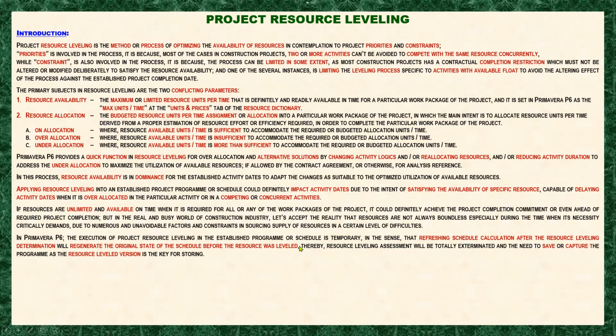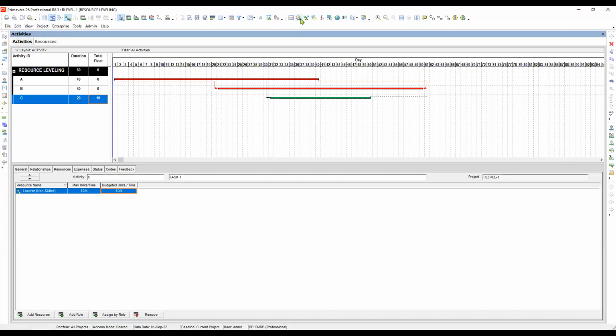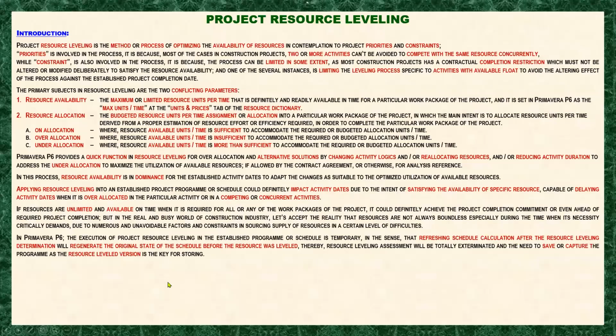You know what I mean? When you run leveling on your schedule, you get the determination of the resource units or the new dates of your schedule due to the application of resource leveling. But once you run the schedule after you execute the leveling process, it will erase the leveling result.